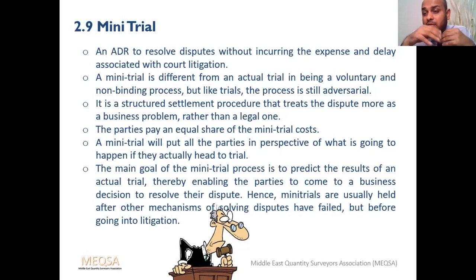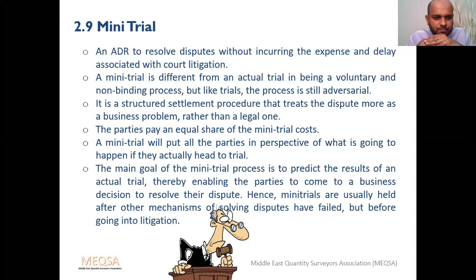Not official, but the kind of a thing is there. So it is a structured settlement procedure that treats the dispute more as a business problem rather than a legal one. So the person who is resolving on the bench will be looking from the business perspective rather than the legal perspective, which means money is the matter rather than the facts. If a lot of money is involved, then he'll put more pressure. If it is a small issue, he'll be ordering an amicable settlement kind of thing.